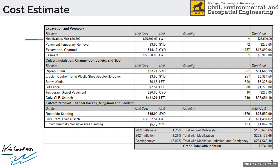Here's a look at our cost estimate, put together using MDOT 2021 unit bid averages for the Superior Region or MDOT Region 1. Some of the biggest costs are the excavation of the channel itself, including diverting water into the new channel from the Silver River. Next is riprap — because the channel is so large, we require a vast amount, coming out to over $31,000. The biggest portion of the project is the culvert installation itself: 210 linear feet, or three 70-foot-long barrels of Class B corrugated plastic culvert, coming out to about $92,000. Lastly, the roadside seeding, with so much disturbed area, comes out to about $26,000.